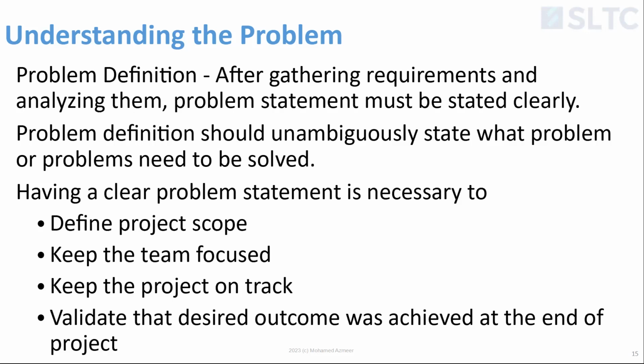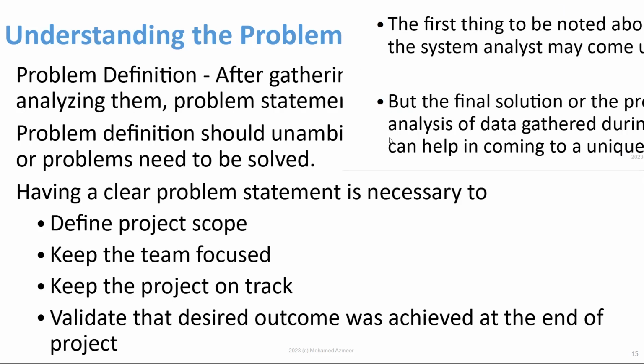we will first finish the first 10 features within 30 days. But the second 10 features will require 60 days, something like that. So we all discuss these things and then try to agree on how to go about doing it. So essentially, everyone agrees on what you are going to achieve at the end of the project. So this communication is very, very important.